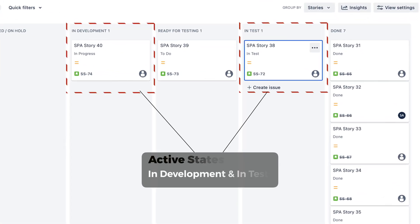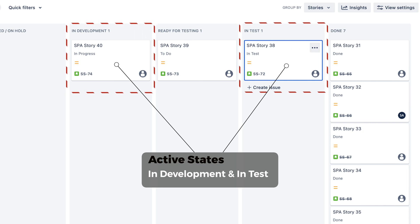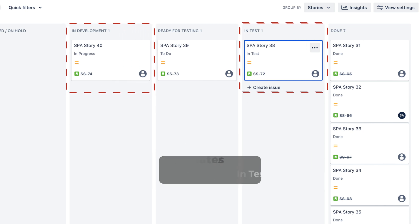We just need to add up all the time the story spends in our active states — in this example, In Development and In Test. The data for this is automatically tracked by whatever agile tool you're using in the background; you simply need to extract it. If you're using Jira, check out the linked video to see how. The principle is the same no matter what tool you're using. You can get this data with plugins like Timing Status or EazyBI, or by using ScriptRunner. You can also do it natively in Jira using custom fields and automation rules. Check the description below for ideas on that.